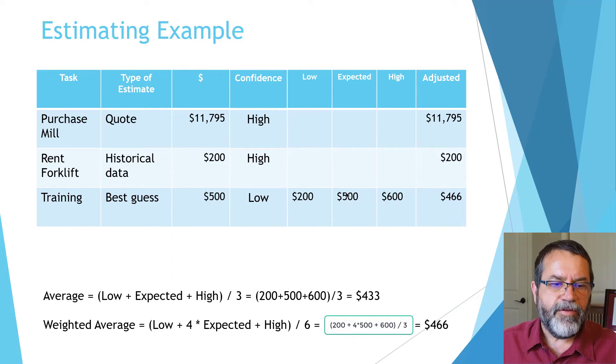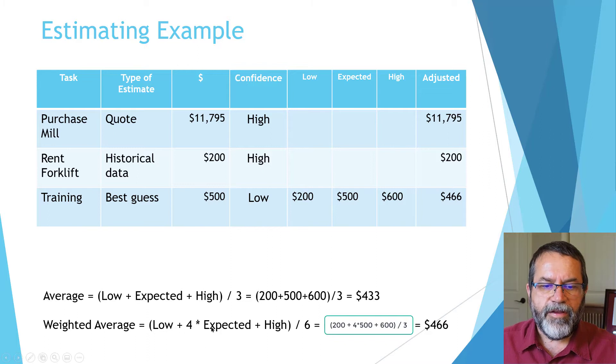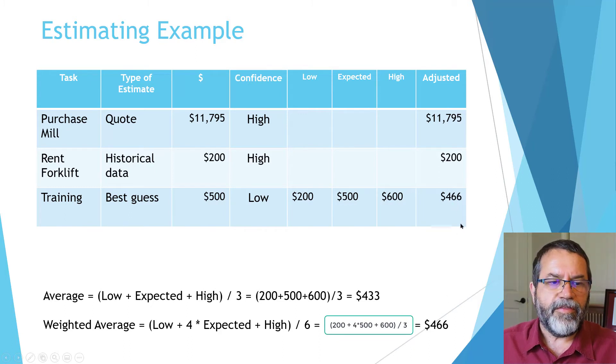I can do a simple average, which gives $433, but I don't want to do that because I expect the price to be $500. So I'm going to do a weighted average—put more weight on my $500 estimate and less on the high and low range. I take four times my expected, add in my low and high, and divide by six. That comes up with $466, which I think is a better estimate.